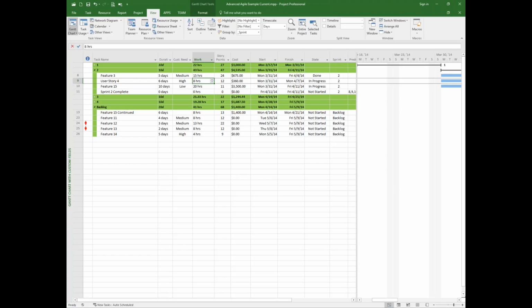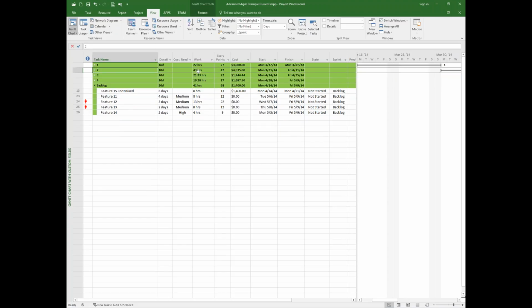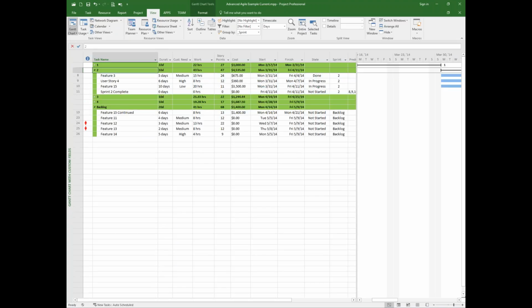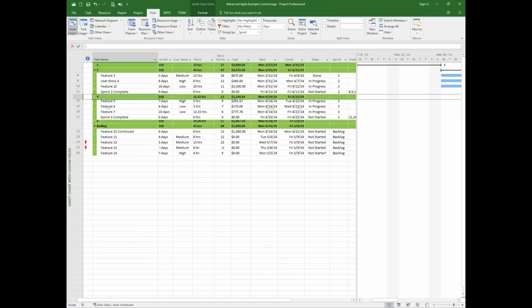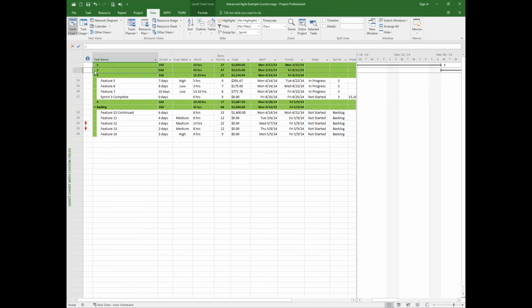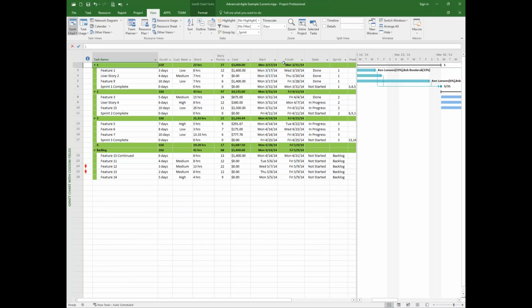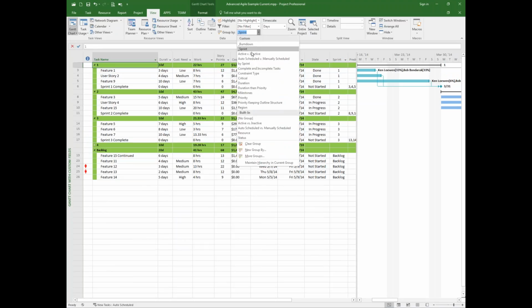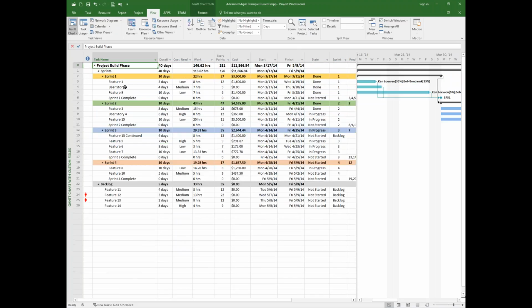That's where story points come in, allowing you to define, hey, maybe we're trying to bite off too much work in our sprint cycle, in sprint 2, which might be a 2-week or a 3-week cycle. We may want to move some of these user stories or features into another sprint that might be a little bit light. Again, remember, Project and Visual Studio are tools to help you manage that work, but they're databases, and we want to bring this information to life.